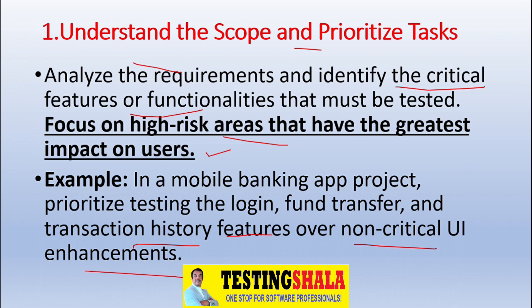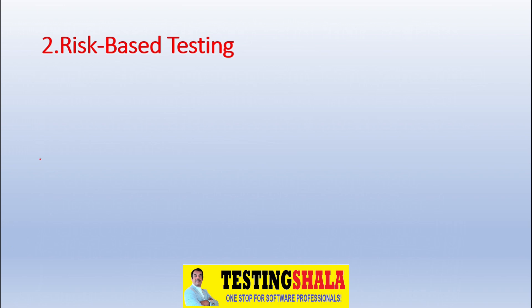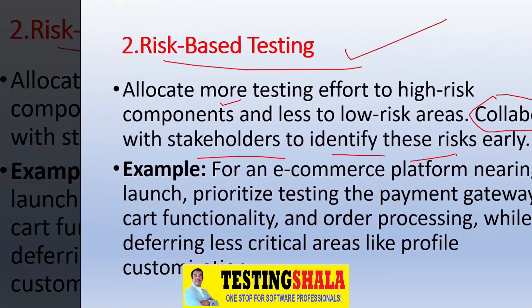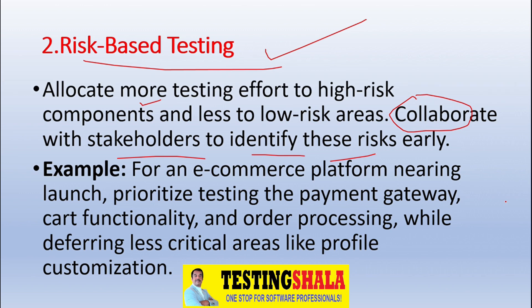The second step is risk-based testing, which is very important with limited resources — both human and hardware. We should allocate higher-risk components or modules to testers rather than low-risk areas. We can identify risks by working with stakeholders early. For example, on an e-commerce platform we should prioritize high-risk areas like payment gateways, core functionality, and order processing over less critical areas like profile customization.